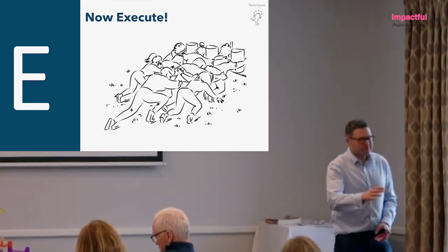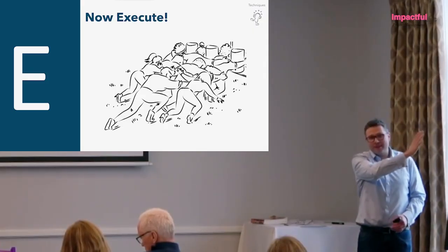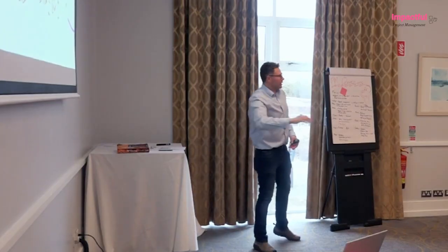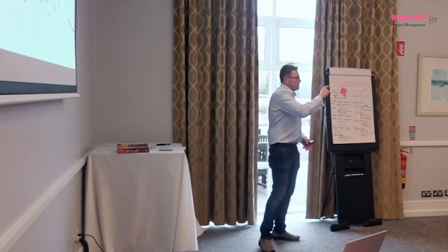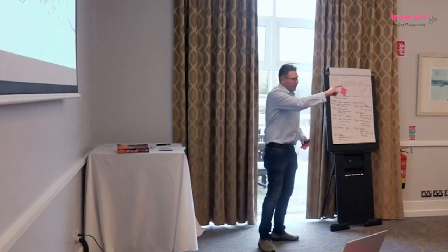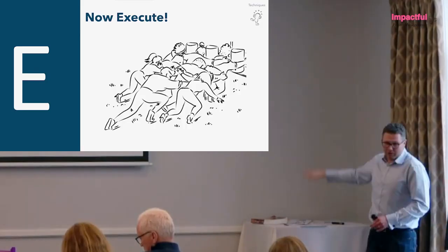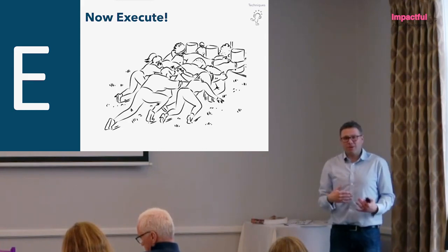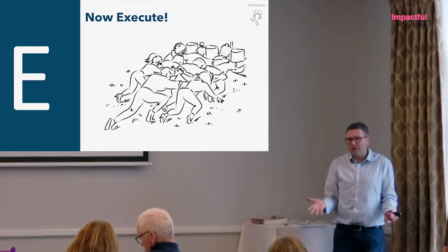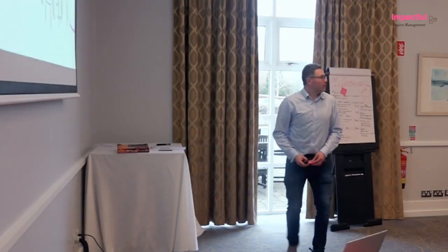So you're going to sit down with your team. You're going to do silent writing. You're going to ask the question. You can use a statement like, how might we do such and such? It's a really good way to start the question. How might we roll out the change to 20,000 people? And then you're going to get the ideas. You're going to look for the affinity cluster. Then you're going to prioritize them. And then you as a project manager can just go and write that up. Now you've got a plan. You've actually got the starting point of a plan, and all you've done is facilitate a meeting. So, very, very powerful.